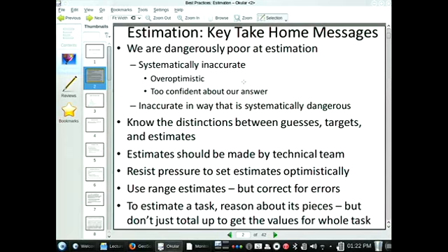The whole thing, it's very easy to fool yourself. In general, you're thinking about some big, vague sort of notion. It's easy to pull a number out of a hat, or worse. And if you break it down into pieces, you're forced to think, in very concrete terms, how those relate to things you've done in the past, how they relate to cases where there have been unexpected barriers, or where you've had to deliver on similar items, and it gives you some basis for giving the number in a way that the task as a whole does not, because often the task is new. You've never encountered it before. So here we're going to reason about its pieces. We're going to decompose it into pieces.